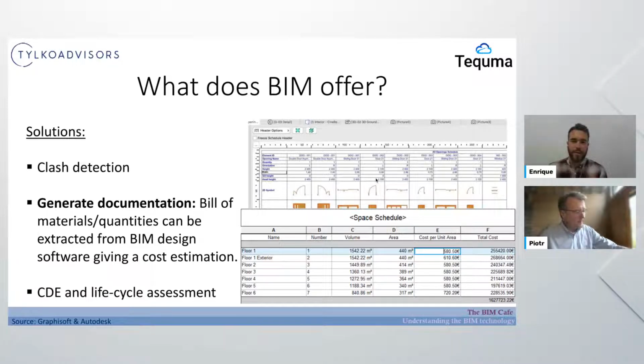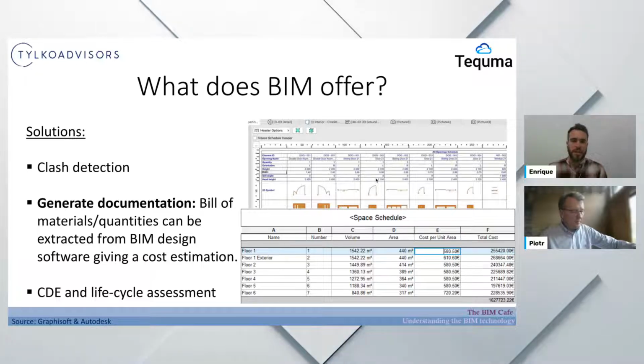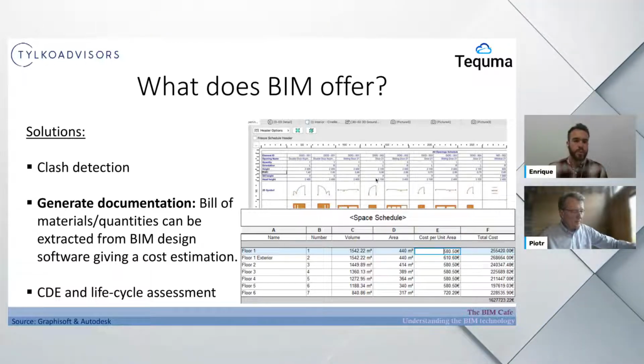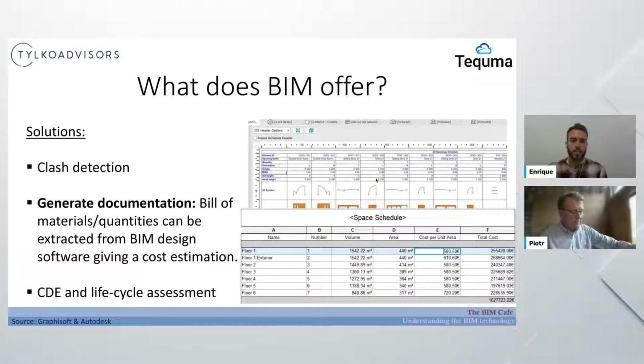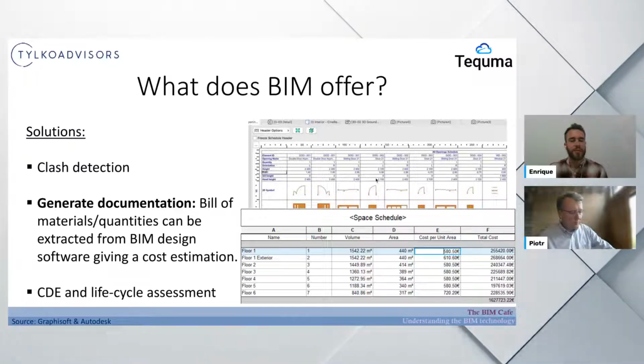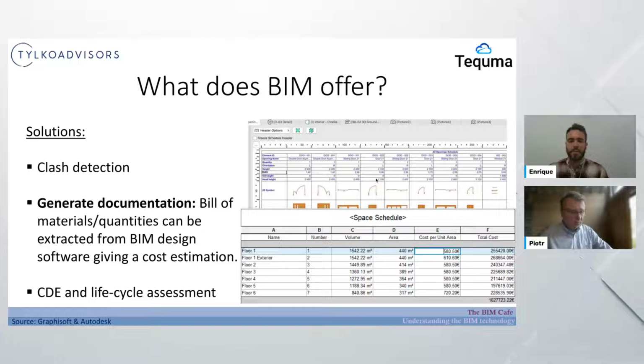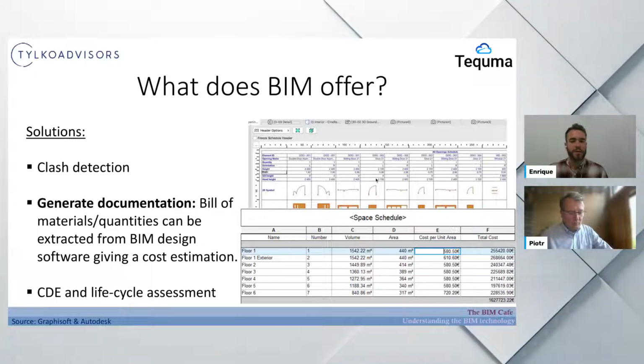Yep. And it's good also because we are talking more about the data here for the generation of these documents. Architects are the ones who actually place the design on the building and set the dimensions. So if we are providing windows, or roofs, or ceilings or whatever, we will need those designs, and we can go inside and see how many square meters we have of this wall, how many roof pieces of this type we have. So we can extract this information from the architects' models without getting in touch with them and asking, hey, how many square meters do you have for this type of ceiling, because I need to put my roof on top. You can see that on the project. The information is already there, so that is also the information flow between the different parties.